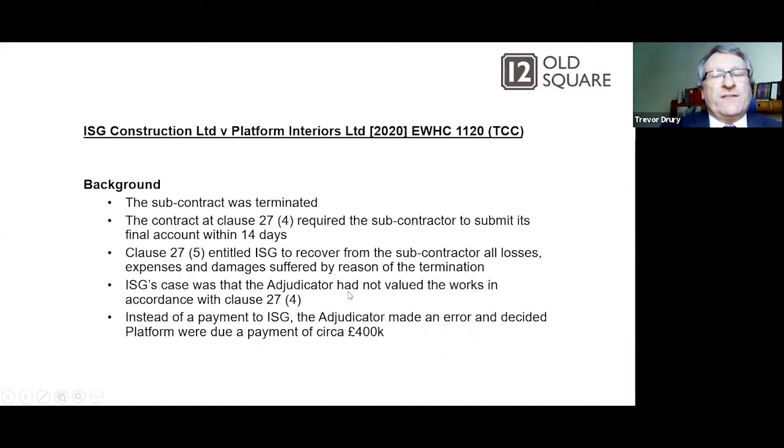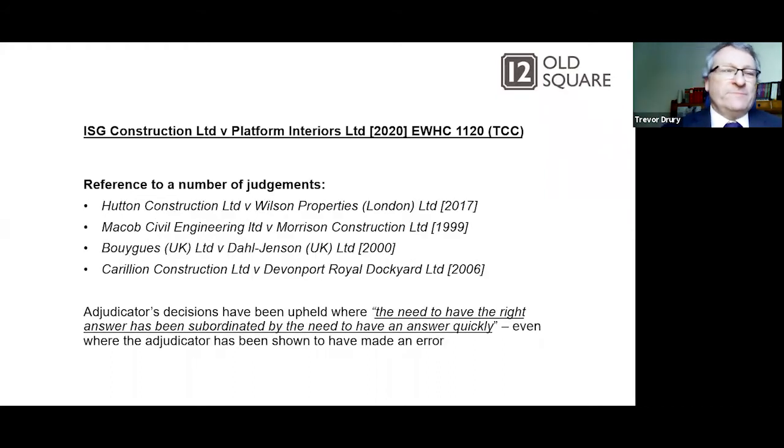I think that the way this occurred is that the adjudicator, a quite well-known adjudicator and a quantity surveyor, had been sort of misled by the parties, and they just took the total costs minus the total value. And because the main contractor hopefully has bought his subcontractor at a profit, the cost was much lower than obviously the value, and so it reversed the whole number of the figures. So it had a slightly bizarre consequence, really.